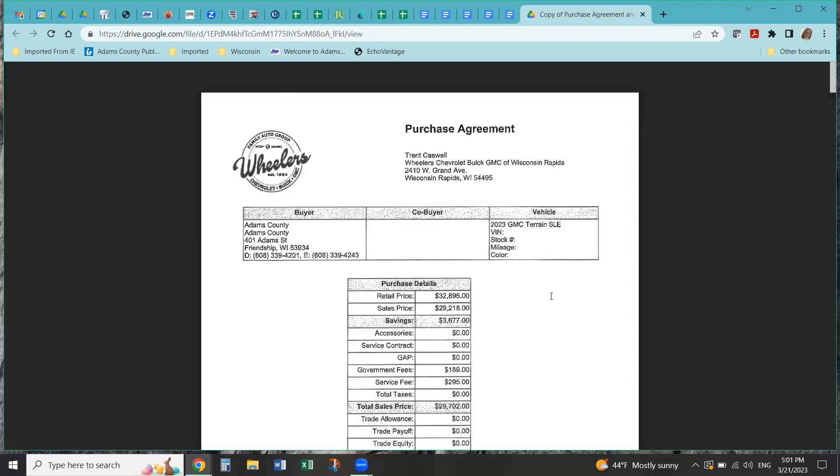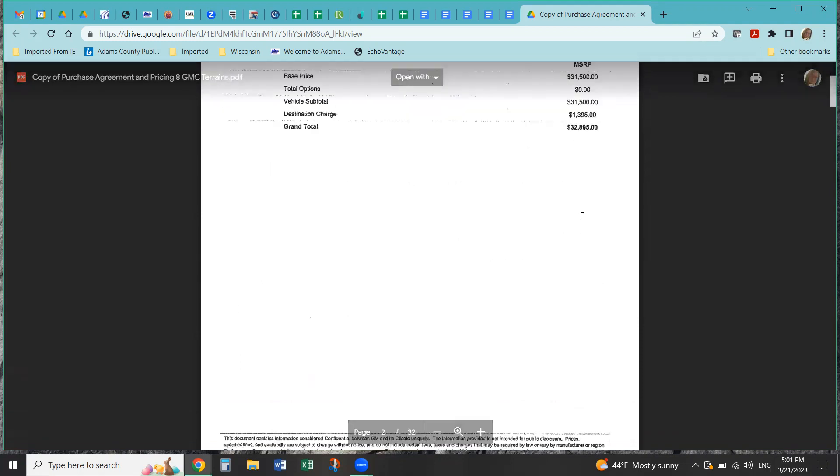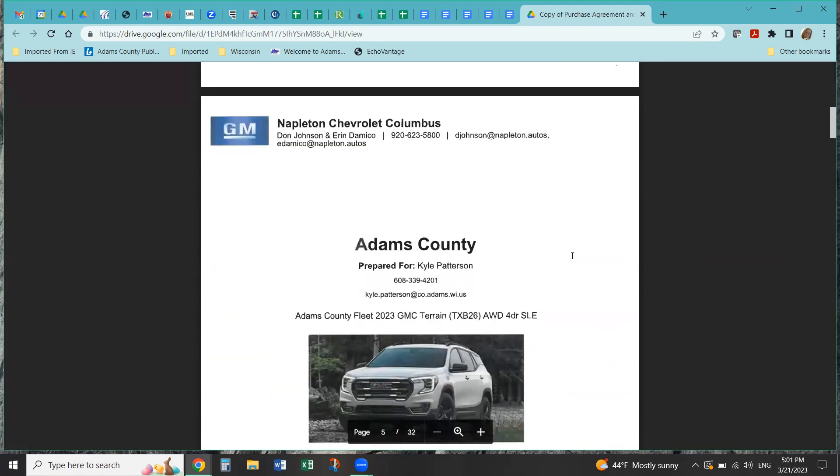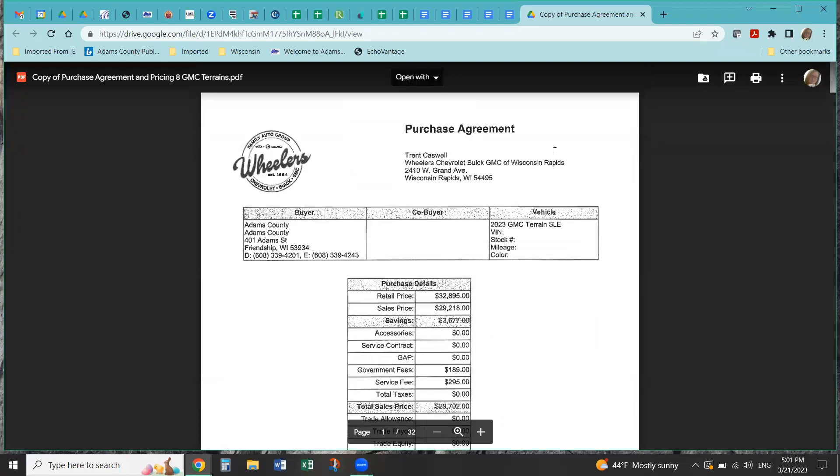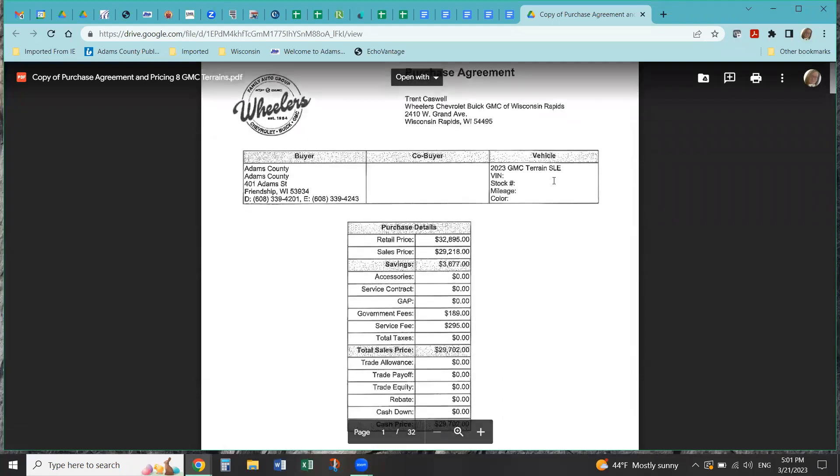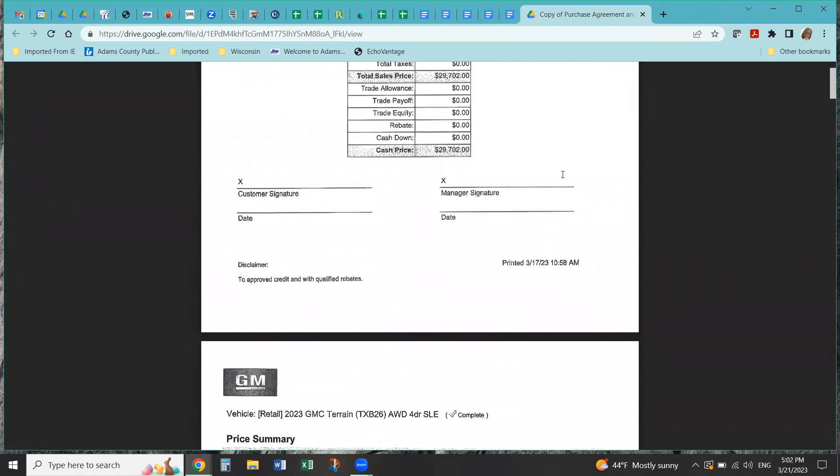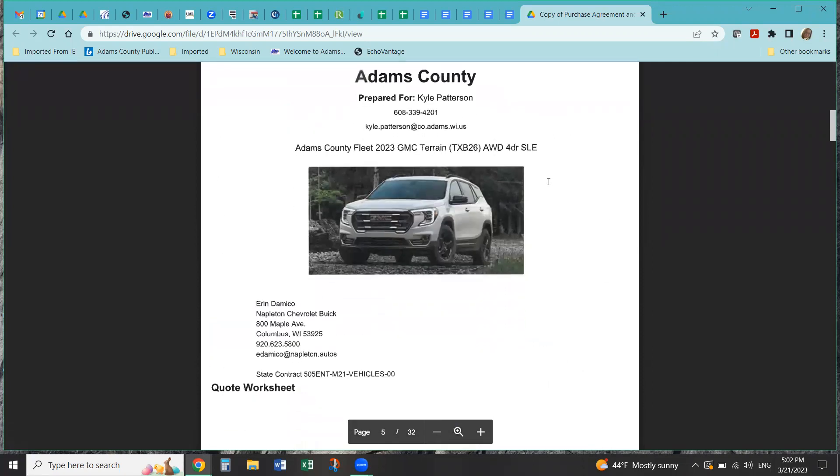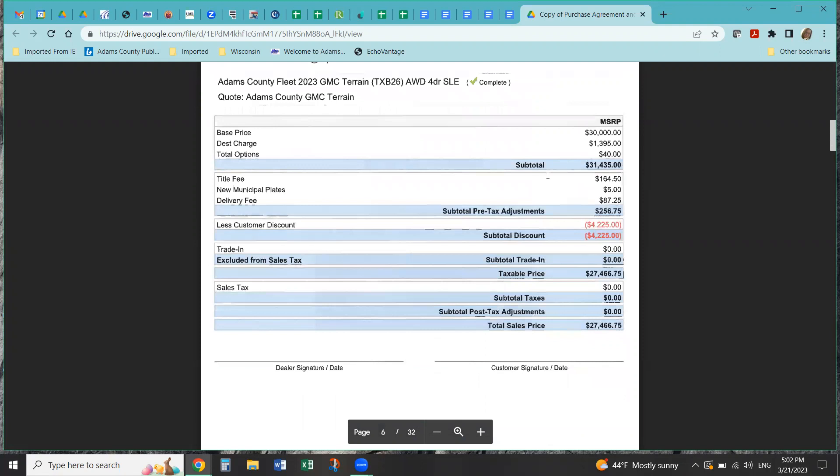I contacted Kelly to see if those would be a good alternative to the Malibus. And she agreed that an all-wheel drive GMC terrain would work for their needs. However, I only received one quote initially, and that was from Napleton. They're the dealer that Wisconsin awards the contracts to, but they did not have GMC terrains on the contract on the state website. So I reached out to Wheelers in Wisconsin Rapids to get another quote. Their quote was for $32,895, and Napleton's was for $27,466.75.